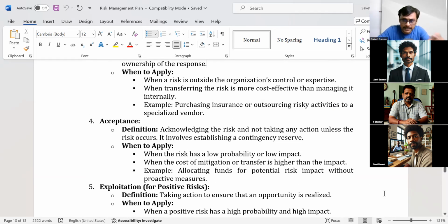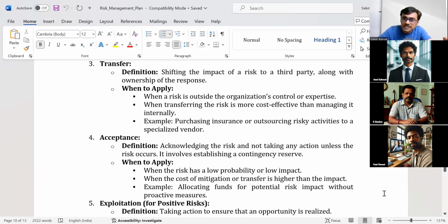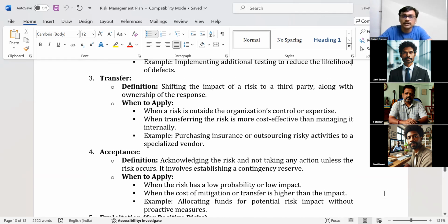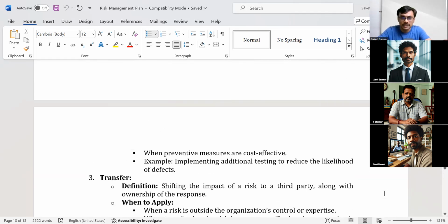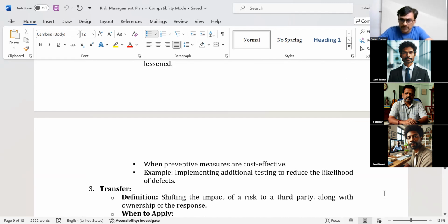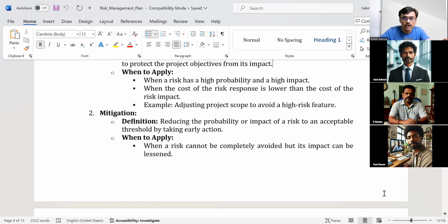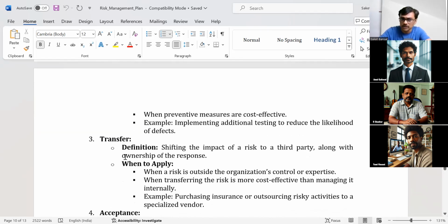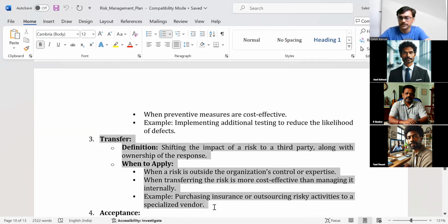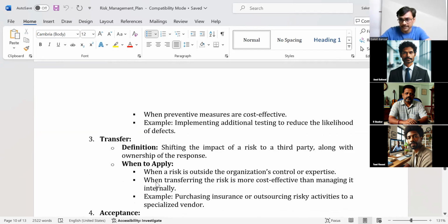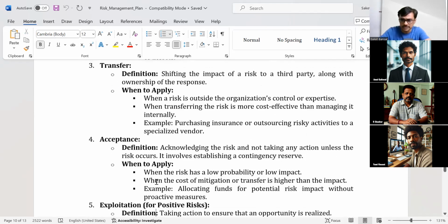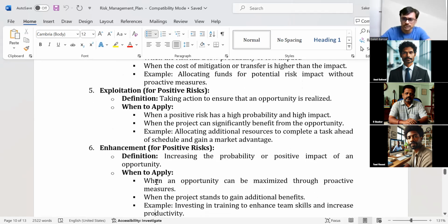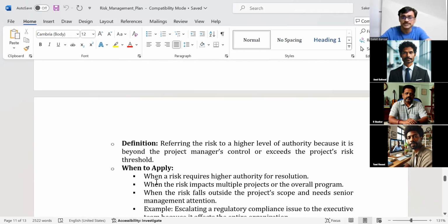But as of now, here I'm just saying that we need to agree on what is the preferred response strategy. Depending upon risk categories or risk characteristics, you can say that such kind of risk needs to be handled this way, and such kind of risk needs to be handled this way. So we can say, okay, these are the risk response strategies we'll use. For example, somebody will say, we don't use transfer. You can't transfer to a third party. It is not allowed. You don't have transfer available in your options. We can say, okay, the transfer response strategy will not be planned. So we need to identify that. So here we are giving detail about our risk response strategy. I will talk about it once we get to that level, but here I'm just saying, at the strategy level, you agree.